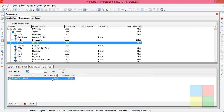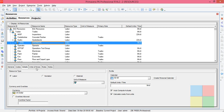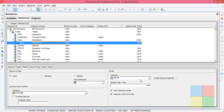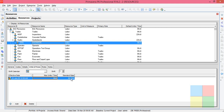So for the project we are using a 5 Day 9 Hour calendar, and for the resource we have also assigned 5 Day 9 Hour — that's why it comes automatically. I'll go back to Details and change the calendar to 5 Day 8 Hour. Now I'll assign a price — I'll go with 100 per day.